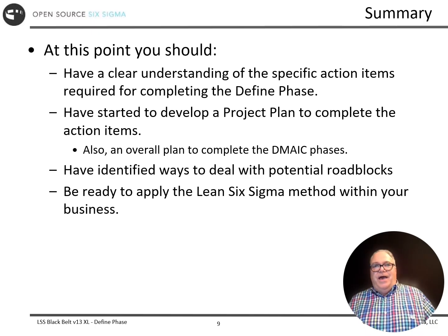All right, so we're ready to move out of define phase and into measure. So we've got a little project plan put together. Again, DMAIC naturally puts itself into sort of project management 101. I've got 5 phases, 5 milestones. I can put timing to the entry and exit of each one of those phases, or I can work backwards. When do I need to have my solutions in place, and work right back into what the dates need to be in order to get there.